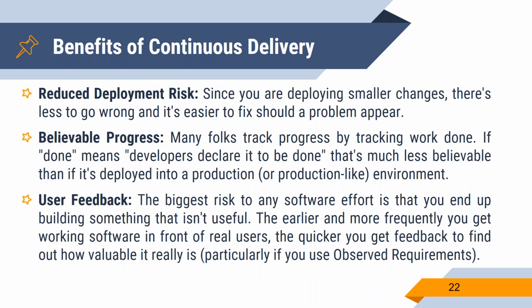And these are the benefits when we deliver small working prototypes to the client: it will reduce the development risk, and we will also get timely feedback from the users on whether we have to improve anything, or whether we are going in the right manner, and we can track the progress also, how we are going and how much time it will take to finish the complete activity.